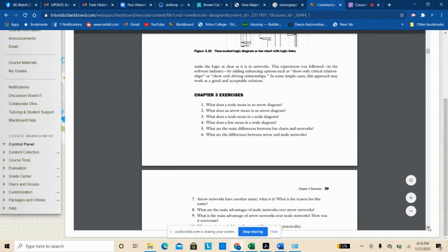Because if they're not visually connected or visually related on our schedule, you might not realize it, but when your concrete guy does something that changes his schedule, all of a sudden your relays can't be energized at the right time, and you have a blackout in some towns. So there's all these different dependencies and tools that they've developed to identify how to get through the visual representation and the logic path of all these different tasks and how they're created.